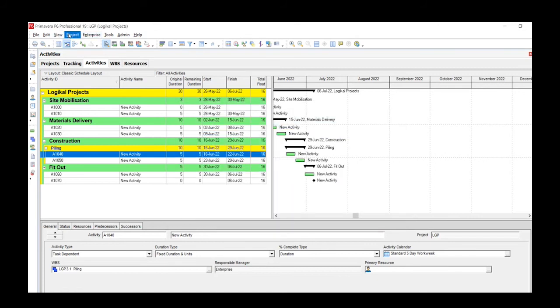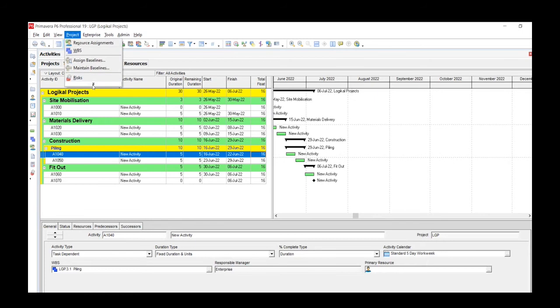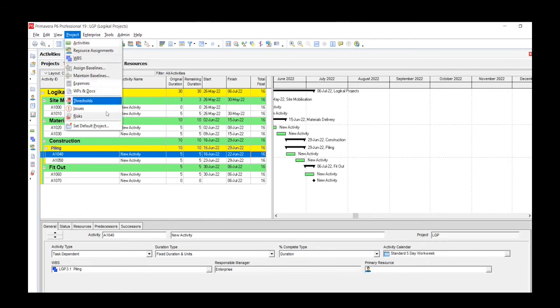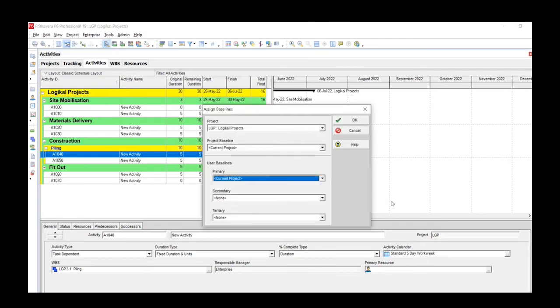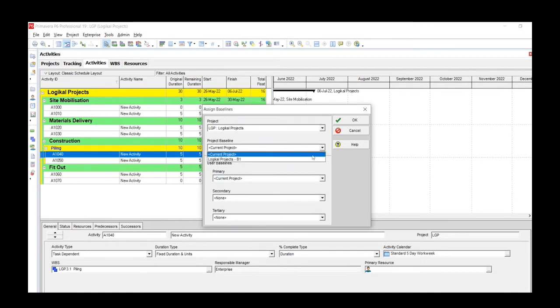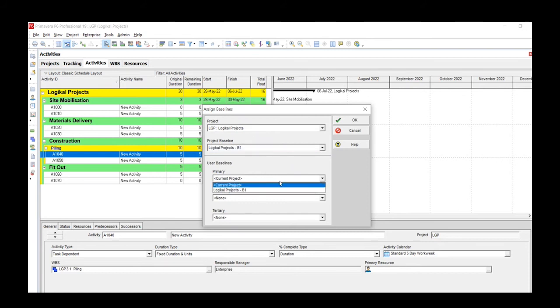Next thing we do is go back to the Projects menu, click the drop down, and click on Assign Baseline. Once you've created your baseline, you need to assign it straight away to the project. So our project is Logical Projects. We assign the baseline, go to Primary, and we assign that.